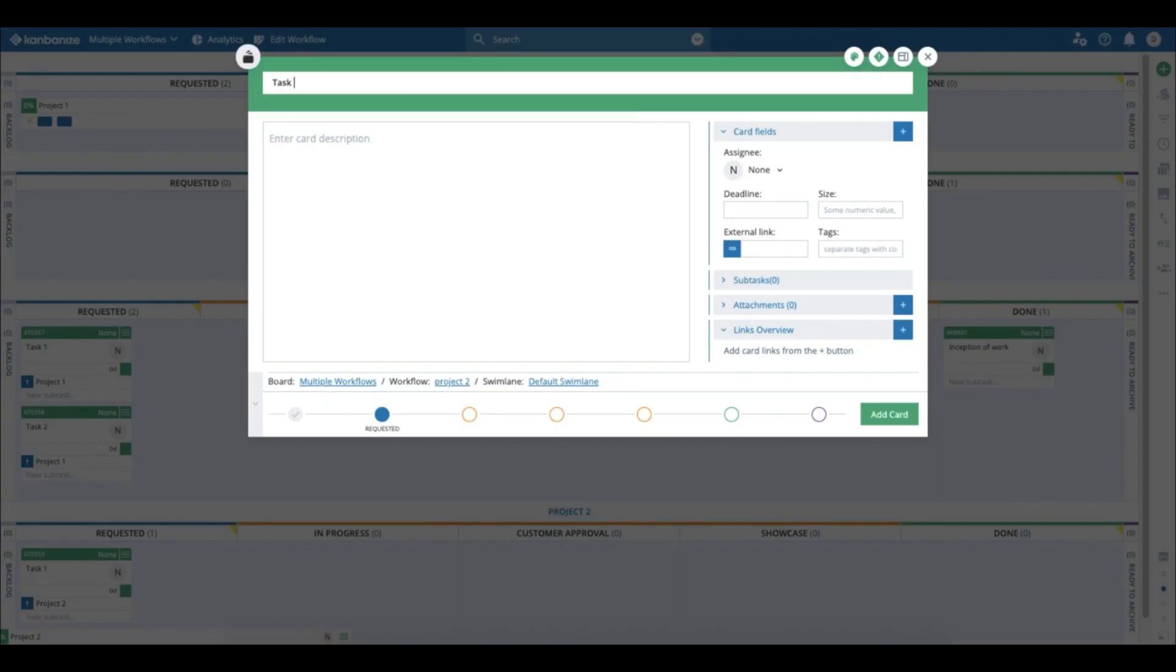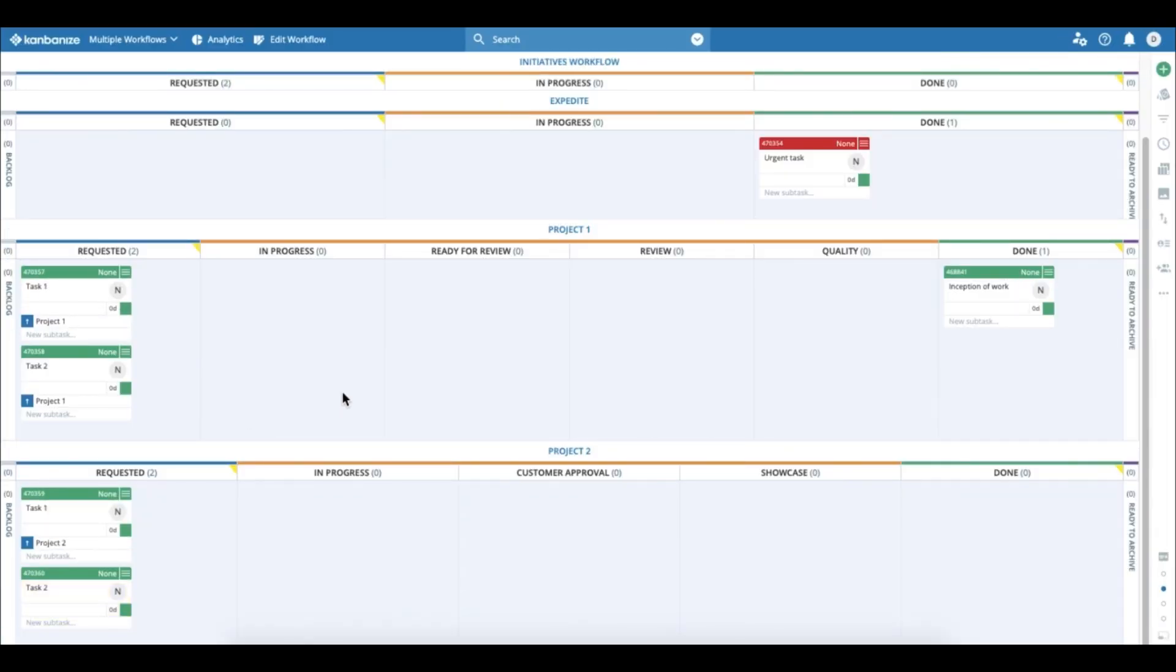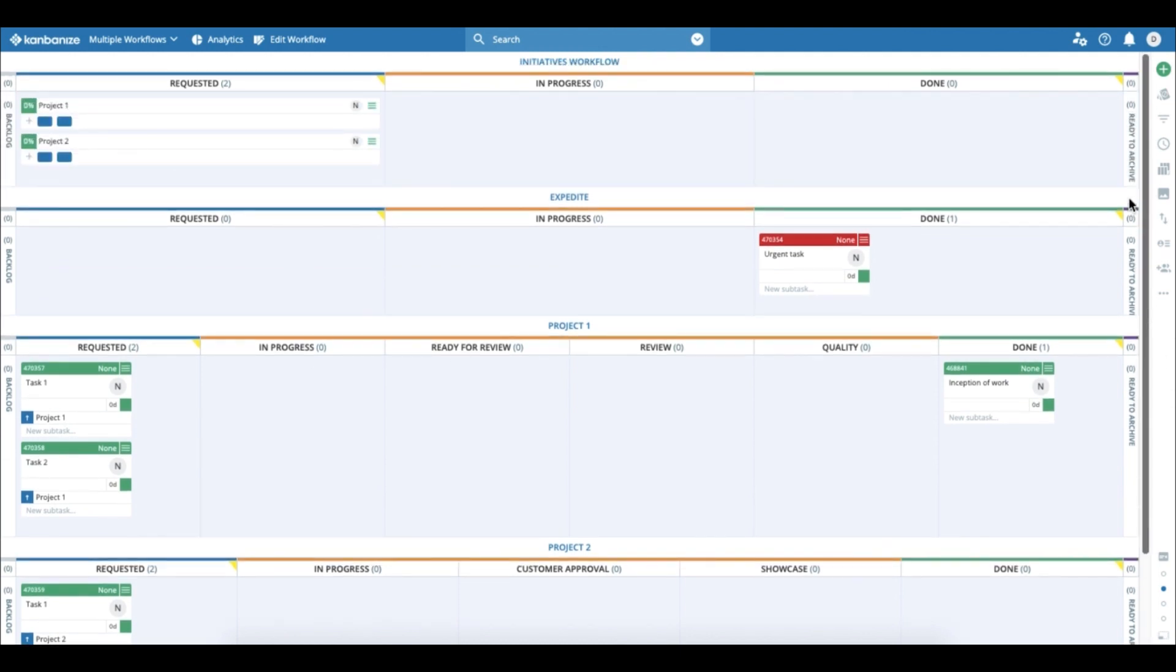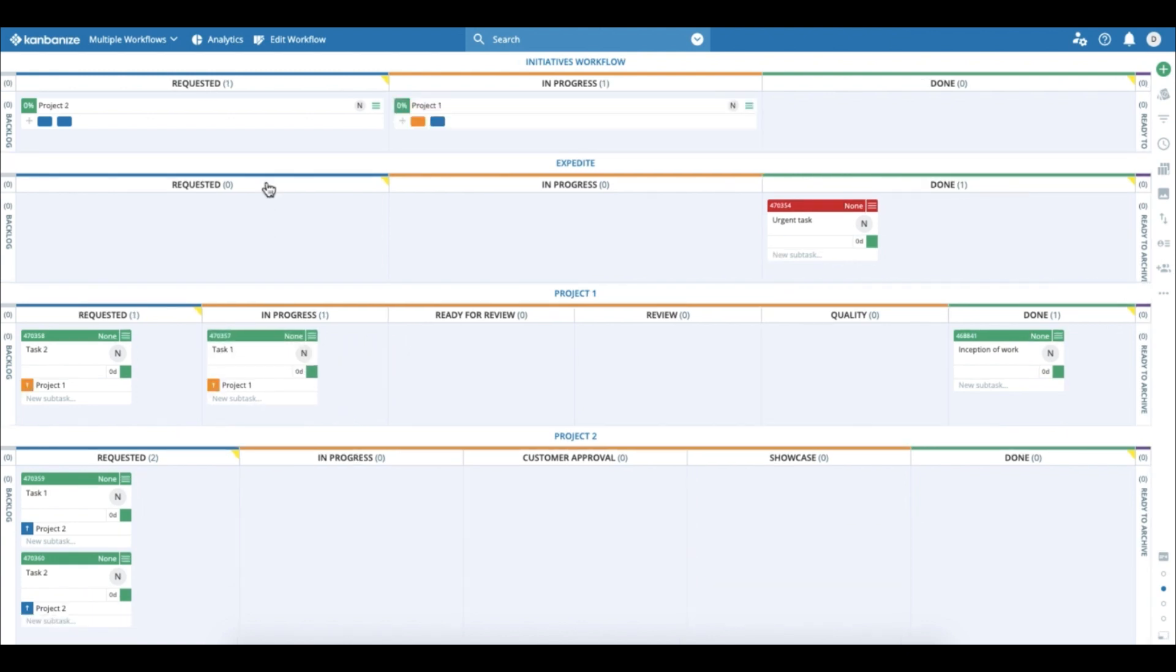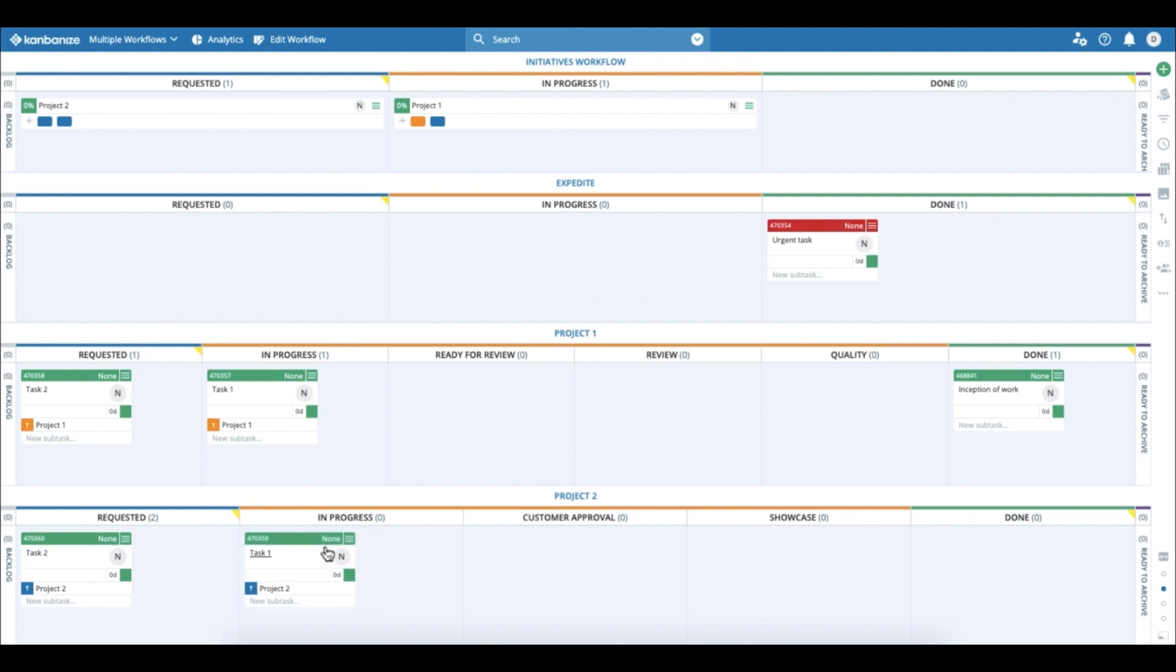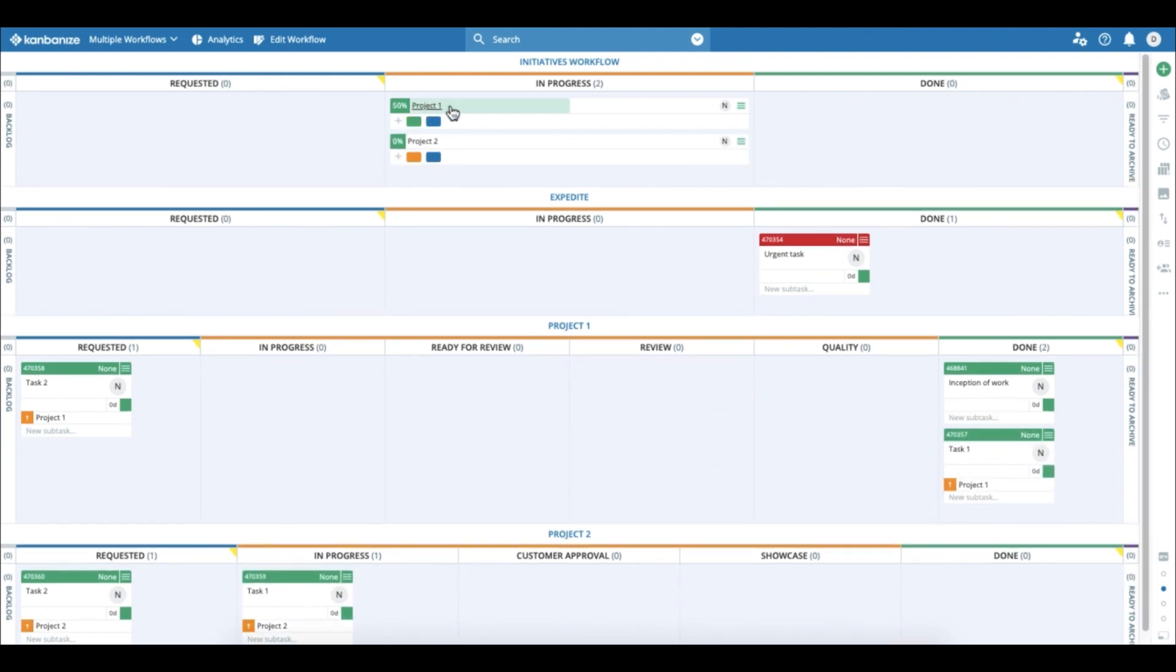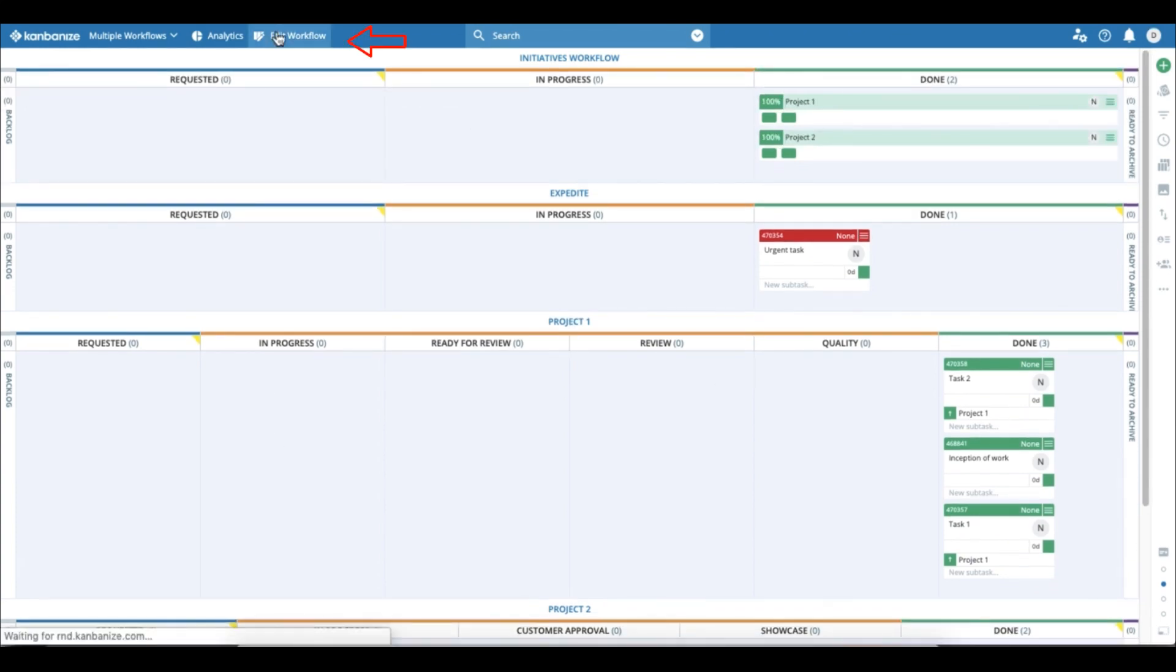Now comes a cool part when the team starts working on those tasks. We see that the projects, because of the automation in the initiatives workflow, the projects automatically go to in progress and automatically track how much completion we have. And of course, when all the work gets to done, the projects or the initiatives go to done automatically.